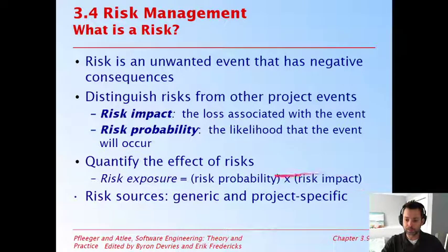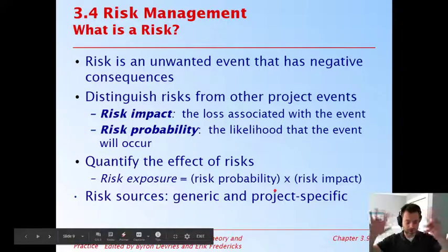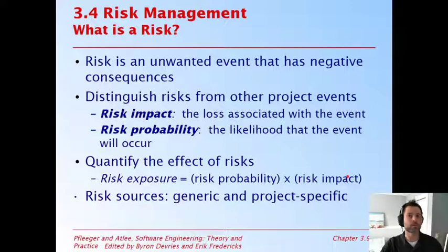And multiplying these together gives you the exposure. So what is the actual numeric value of risk? And I'm hand waving, I'm literally hand waving in front of you right here, right? These numbers are going to be domain specific. Your impact might be, you care about money. So how many millions of dollars can you push through on a conveyor line?